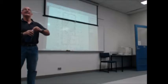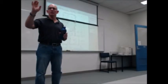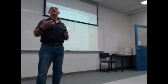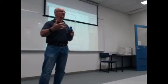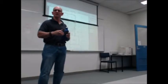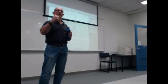I built a house for, this is the sort of people you may have dealt with, he was a big wig with IBM. Traveled all over the world, some sort of problems, whatever he did with computers, human resources, I don't know. Built this house for him, and I explained about tiling, about PC items. You've chosen a tile, and at the time you just wanted like $25 a square meter. I said, where you've got to be careful is borders, because as soon as you start putting a border in, you drop off the square meterage, and you go to buy the tile. Nice. And then you've got the labor.